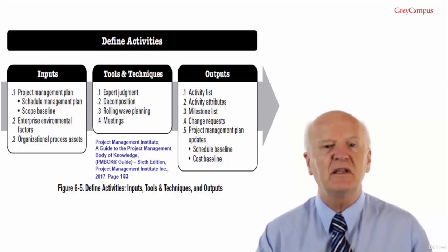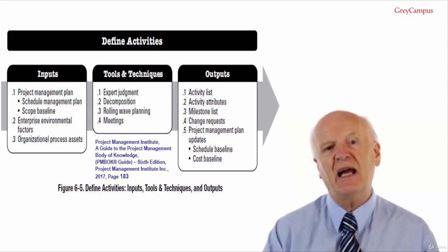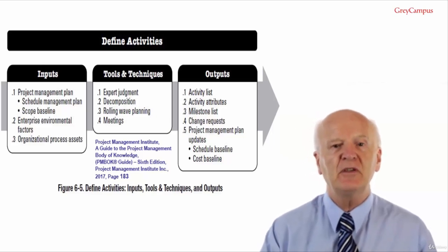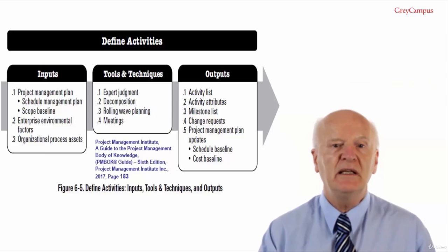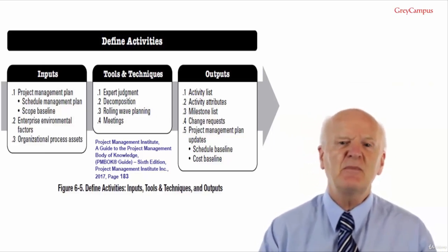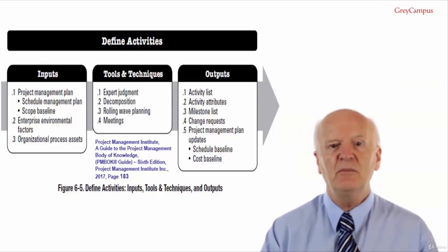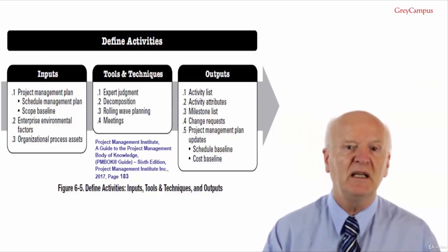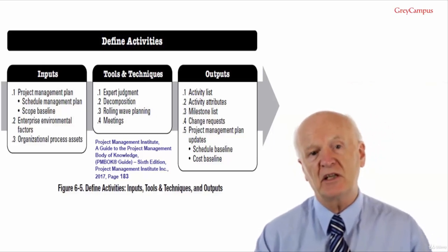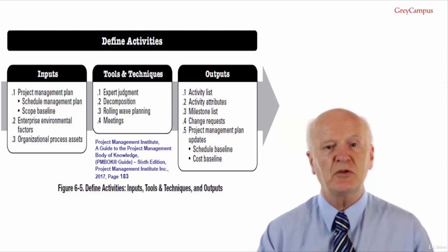Activities represent the effort needed to complete a work package. Did you notice the difference between effort and duration? Effort is the number of work units that the activity will require, and duration is the span between the start and the end of the activity. These may sound similar, but imagine an activity that requires 2 work hours, but the first hour's work is done on Monday and the second is done on the Friday of the same week. The effort, which we will usually call the level of effort, is 2 hours, but the duration is 1 week.